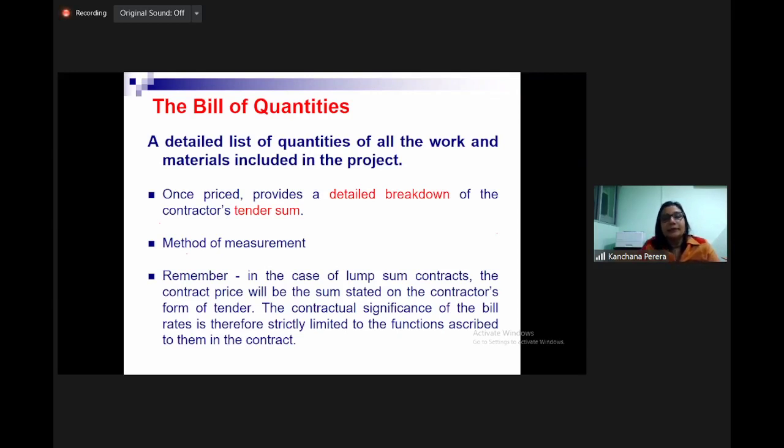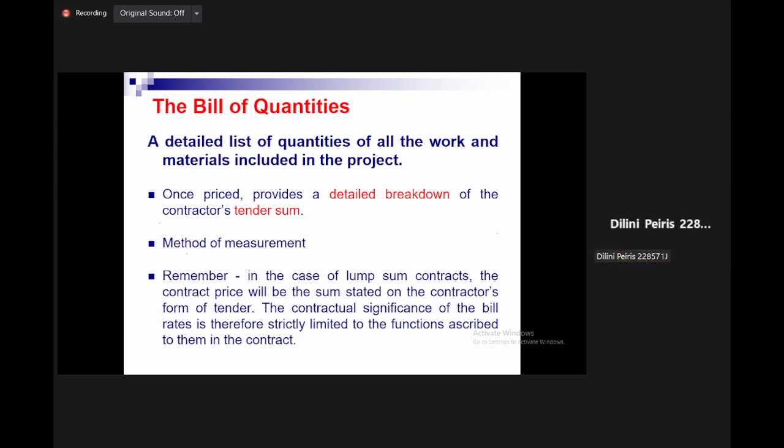Right? Anything else you would like to highlight about this BOQ? Any other question? Madam, if there's a discrepancy in the materials mentioned in the BOQ and the drawings, and also according to the order of precedence in the contract document, if the BOQ comes first, then what can we do? For the construction, the BOQ will not come first, no? The drawing comes first.